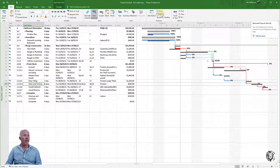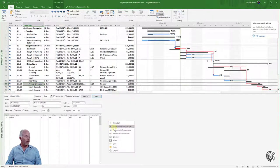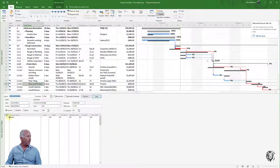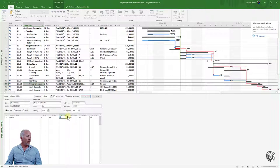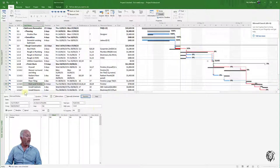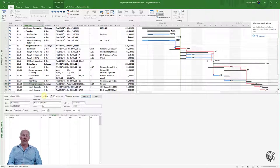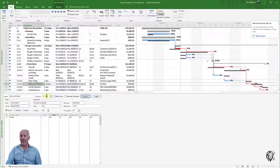The easiest way to do this—we're in Task view—is to bring up the Details. I'll make sure it's set on Work. We see the finisher is working two days, eight hours a day. I'm going to approve four hours of overtime. The actual duration per our work schedule is now down to one and a half days. Keep in mind there's an extra four hours being worked overtime.